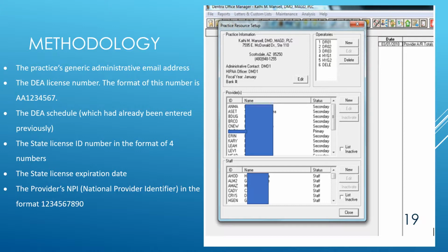The next step to activate ePrescribe is the one that would actually accomplish the project's goal. It is also, unfortunately, the step that proved to bring the project to a halt. During the vetting of the solution, there is no mention of additional costs for adding modules, so one could assume, and both the dentist and I did, that the monthly subscription fee to Dentrix covers the additional modules. That assumption proved to be an error.